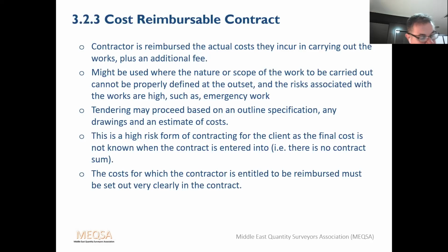If the actual cost is lower than the target cost, the savings can be shared between the parties to the contract on a pre-agreed basis, often a percentage. If the actual cost is higher than the target cost, the additional cost may also be shared, but possibly only up to a guaranteed maximum price, in which case, if the price goes above the guaranteed maximum price, the contractor is liable for all costs over this figure.